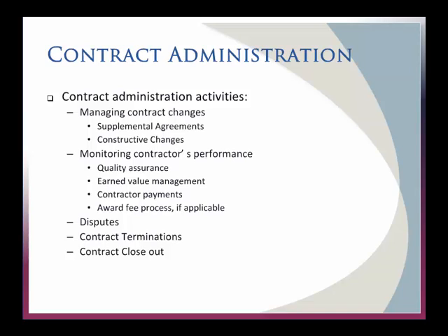You're also going to be monitoring their performance. You're going to be checking their quality. You're going to be setting up milestones so that they have wickets they have to go through. You don't just want to drop all your money on the street and compete it and then have the contractor go away and they come back a year or 2 years later and either they succeeded or they didn't. You might have wickets they have to go through, where at some particular point they have to demonstrate for you that they're making adequate progress so that you can determine whether or not you're going to continue.